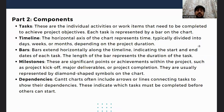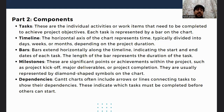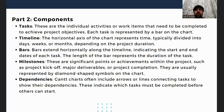The next topic is the components of a Gantt chart. There are five major components. The first is tasks — the individual activities that need to be done, what is completed, and what still needs to be achieved. Second is the timeline, which is the horizontal axis representing when each activity will be completed. Third is bars, which extend horizontally along the timeline, indicating the start and end dates of each task. Fourth is milestones — significant achievements such as the completion of certain tasks. And fifth is dependencies — Gantt charts often include information on which tasks depend on other actions.